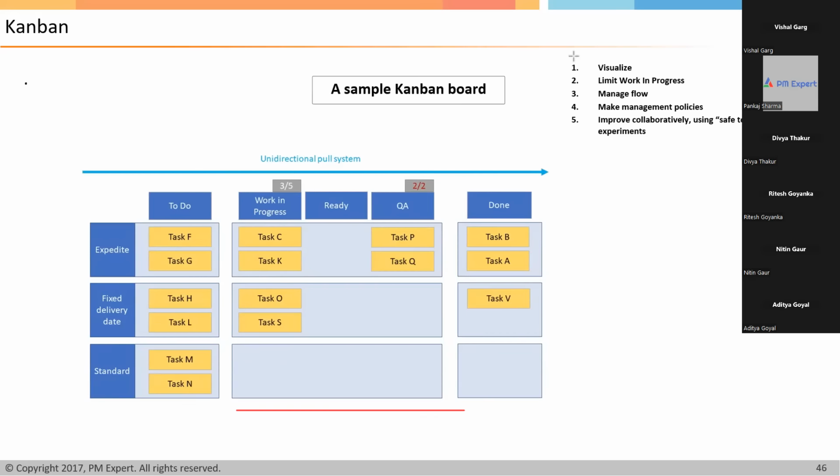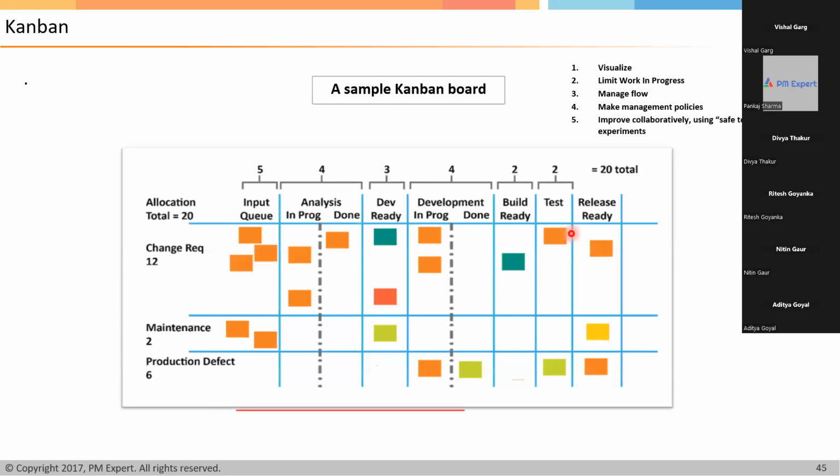Similarly, if I talk about this chart, what is the cycle time here? From this point to the completion, will it be cycle time? Yes, the time from in progress to completion. Now, how can you measure cycle time? You can note down the time of multiple items as they move from here to here, and you can take the average time. Can you take the average time?